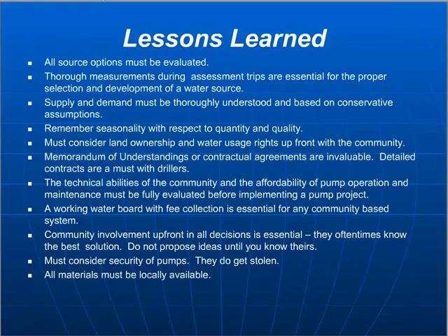Sometimes chapters find that they can't collect all the technical data that they need on one assessment trip, especially considering on your first assessment trip, it's the first time you're getting to visit the community and understand some of the non-technical aspects of the project. And so it's really important to think about the potential of having two assessment trips in case you need to collect all the data you need just for that first step of selecting your source. The supply demand is critical and needs to be done during that source selection process.